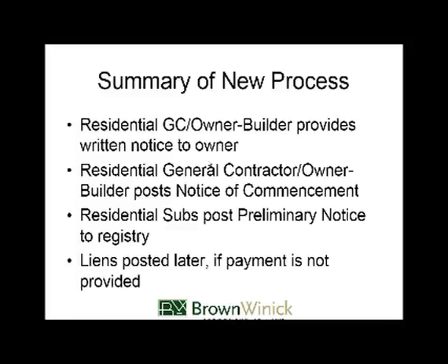It depends on the project and depends on how much people are after. The larger the dollar amount, the harder it is to include all the invoices or backup documents. But I do include some sort of itemization getting from 0 to whatever their number is and how they're getting there. So that is something I do on both of those. That is usually my statement of account.